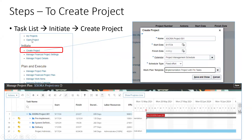Once you click on the task list, you can see a list of tasks which are available. In the initiate area, you have to click on create project. Once you click on create project, you can see a couple of fields which are mandated to be entered: mention the project name, the start date, and you can select the calendar, schedule type, and a work plan template, if you want your project to generate tasks based on an existing template.